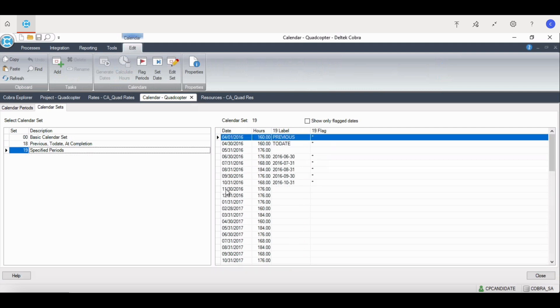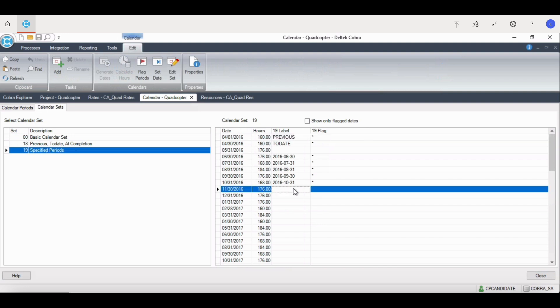Calendar set 19 defines the periods used to generate IPMR formats 3 and 4. As you can see here, our first six periods are labeled as months with the star or the floating flag, and every period after that is by quarter with the dollar sign or the fixed flag.